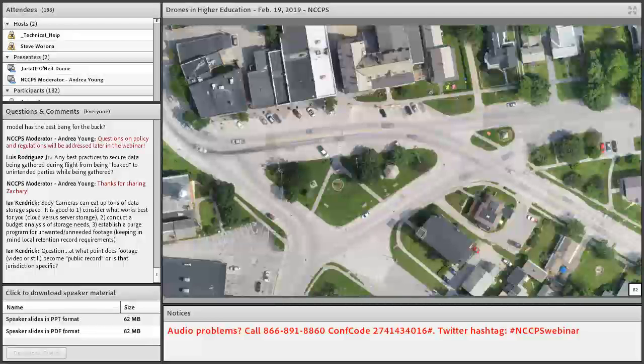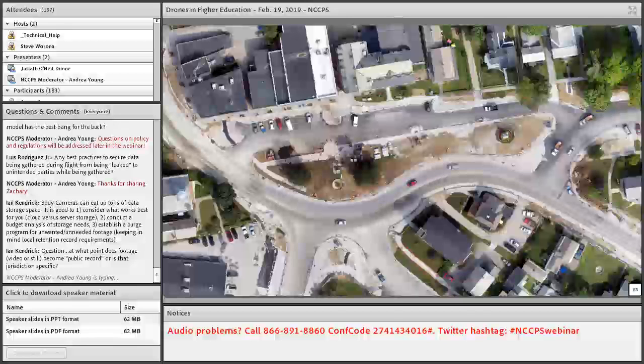And we've also used it for construction analysis. This was a particularly tricky situation in that we had a construction site, but it was also an active area with many homes and people and traffic, and so we had to spend a lot of time getting participant agreements to operate drones in these areas. But here's a pre-construction image, and then here's a post-construction image. And what you see here, as they've redesigned the road and removed trees and done some construction, is that we have verifiable information going forward so that we can check on the progress of this project.